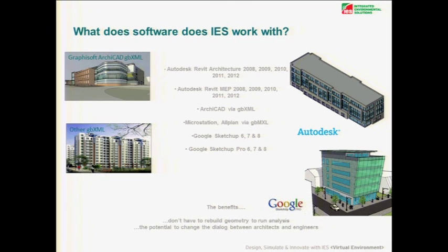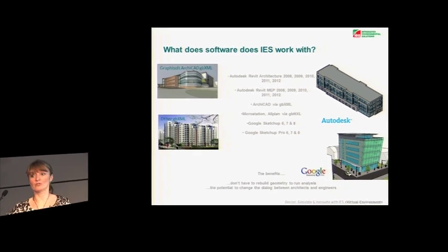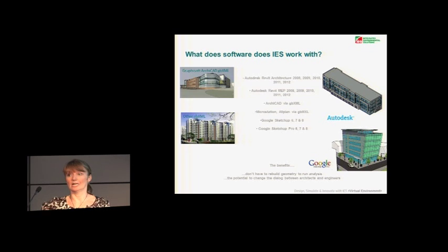And this gets us over one of the biggest hurdles to performing the analysis early on, and that is rebuilding the geometry. Okay, in days gone by, that is what we would have had to do. It takes another 2 weeks, or 4 weeks or whatever to do that, depending on the size of the model. So that slows down the process, and historically, engineers have been reluctant to do any analysis until they have a more or less fixed design. Okay, but what we want is the analysis to be brought forward so that it's actually driving that design and optimising it as we go.